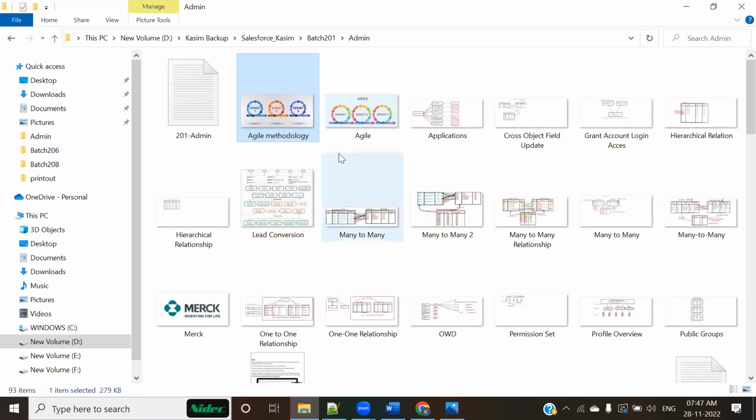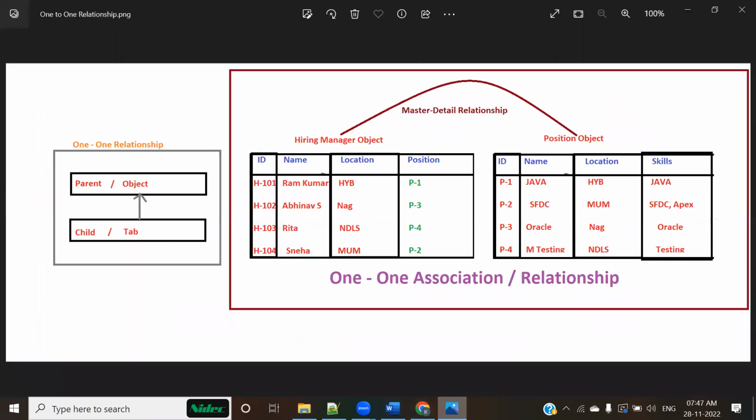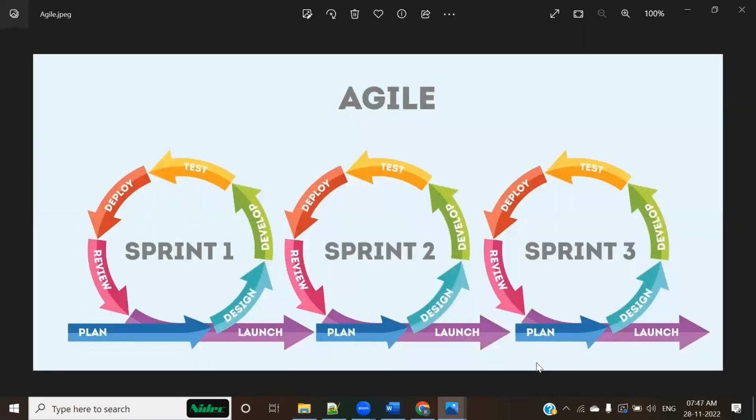So the agile methodology of software development is something that we follow in industry. How we develop, we always develop in sprints. What is a sprint? A sprint is a local cycle of development. This is not a complete product development, because there would be some number of sprints, and that is decided by the project managers, the delivery managers, senior persons in the team.